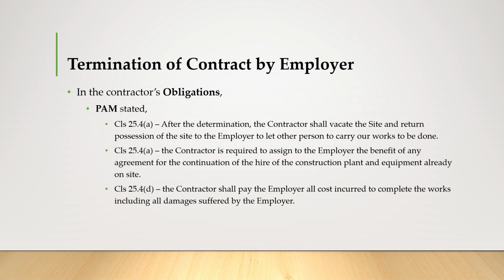So in contractor's obligation, PAM stated that in clause 25.4a and 25.4d, after determination, the contractor shall vacate the site and return possession of the site to the employer to let other persons carry out the works to be done. The contractor is also required to assign to the employer the benefit of any agreement for the continuation of the hire of the construction plant and equipment already on site.